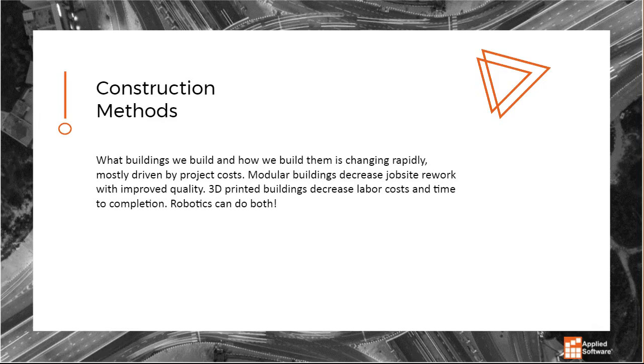And in that, we saw a massive shift to prefabrication. That was already happening over the last 5 to 10 years or so, but we saw a huge push to it in 2020, getting as much done away from the job site as possible in more controlled environments. You could spread people out over the course of multiple warehouses, assemble in a unified location, and then bring those various materials to the job site with less labor required on the job site.